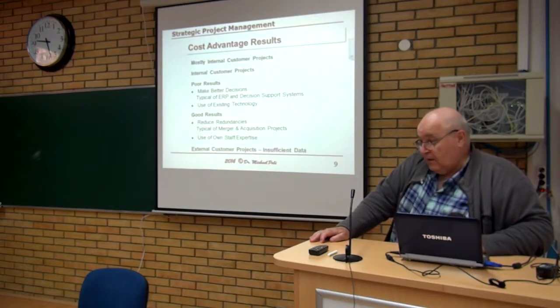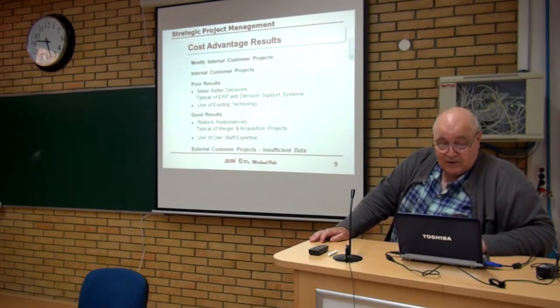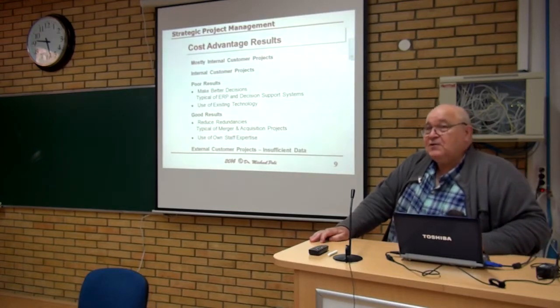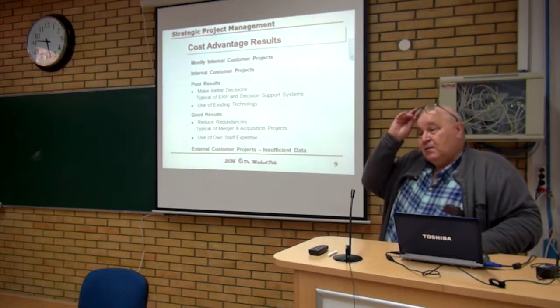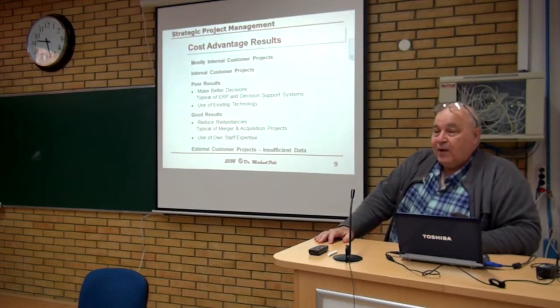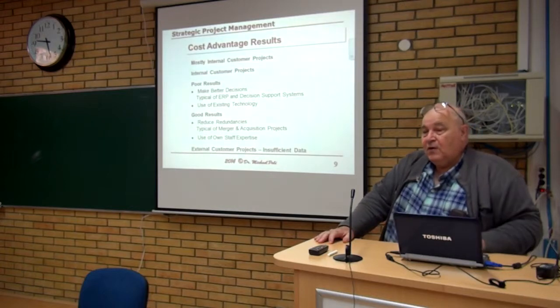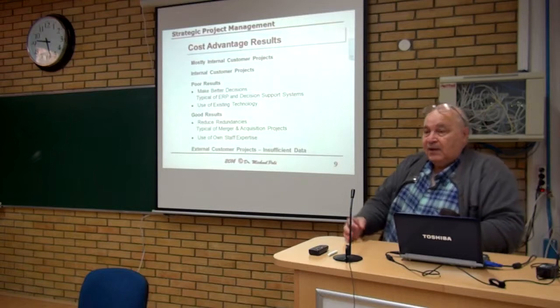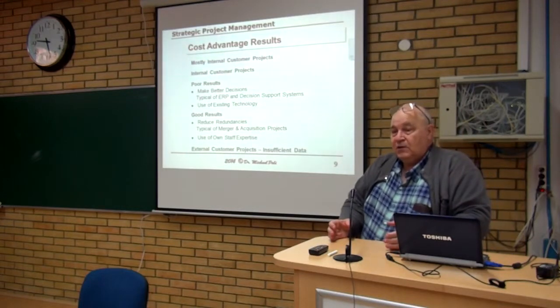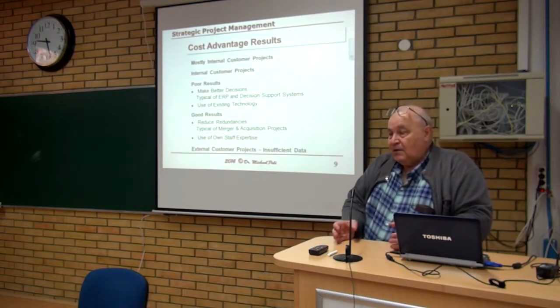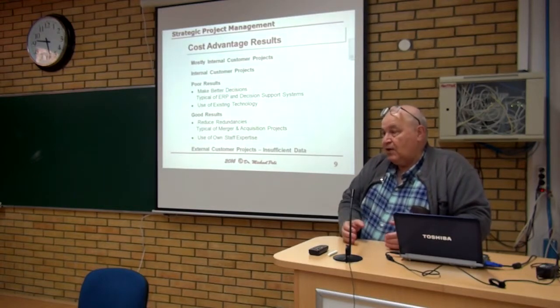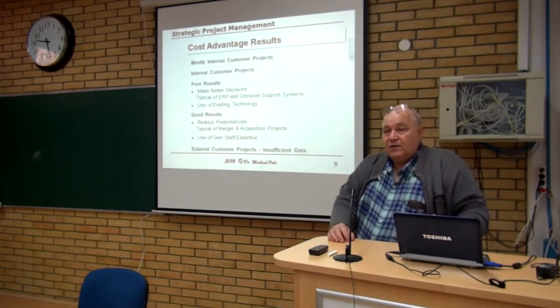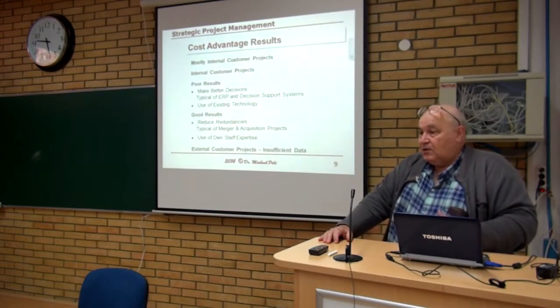Typically, for an enterprise project or a decision support service, they tried to use existing technology. The problem you have on an internal project is you need more efficiency, more effectiveness from the engine in the company, and the engine in the company is using the old technology. If you don't change the technology, you're not going to get major changes in results. So those projects that tried to gain cost advantage by using the old technology did not do well.